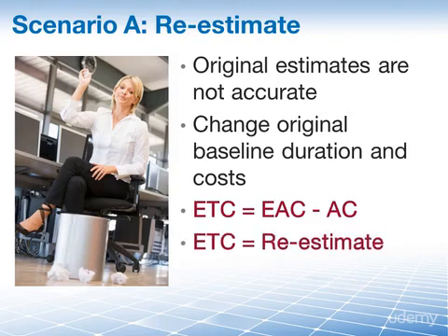We cannot recalculate the ETC. We need a bottom-up method where we re-estimate the remaining work. So we simply say, okay, our estimate to complete, we have to re-estimate this. How much work is left to do? Let's do a new estimation.